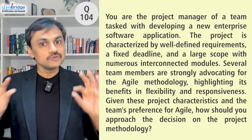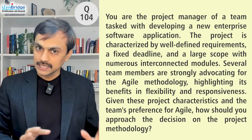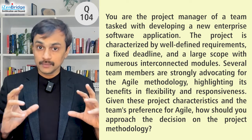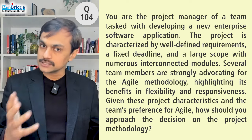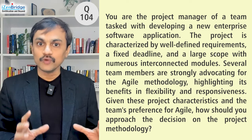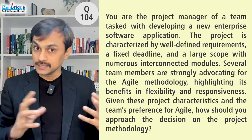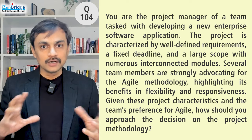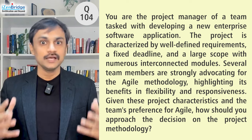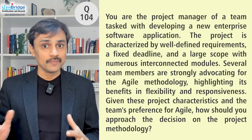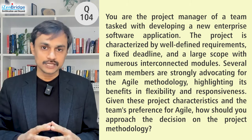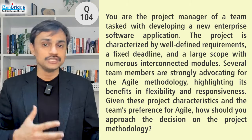Team preference is one of the criteria when selecting the project methodology, because you want people to work in their comfortable process. But you also need to look at other characteristics of the project. Some characteristics given in the question — well-defined requirements and a fixed deadline — indicate you probably want to go for a predictive lifecycle. That's the contradiction this question is bringing. It's a kind of conflict management and project lifecycle selection question, also touching on empowering and engaging the team.